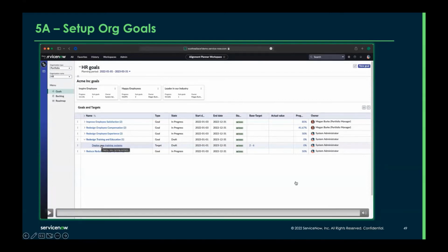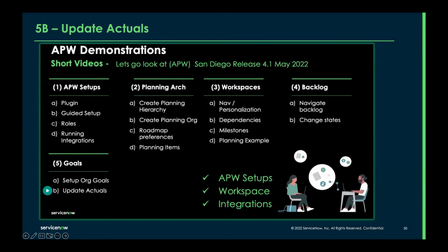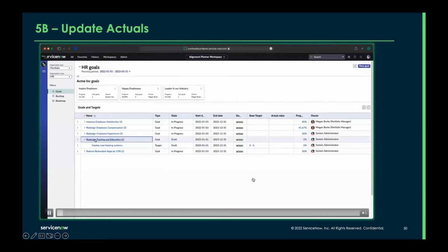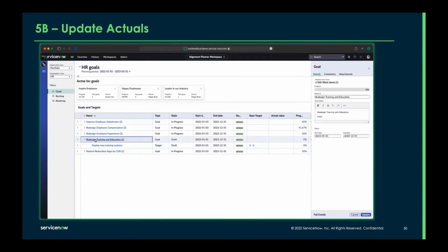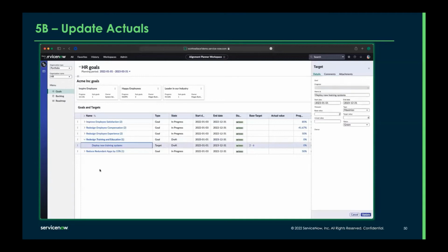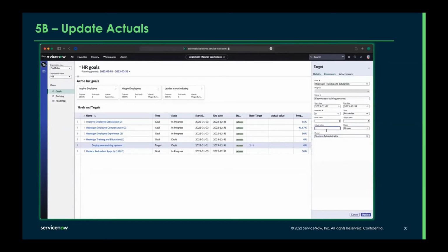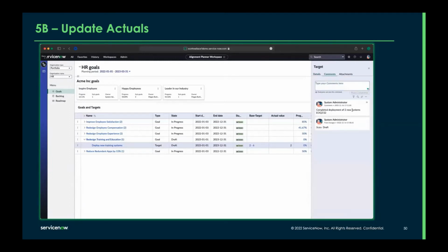And I think the next one here is where we're going to do the actuals. Right, so here I go in and I find the actuals, and here's an example. I put in a couple of actuals, like I may put in actuals in Q1, maybe a Q2 actual. So maybe the first time we put it in, I put an actual in of, yeah, we've got 2 deployed out of 6. I still think we're green. We're getting there. We're making progress, right?